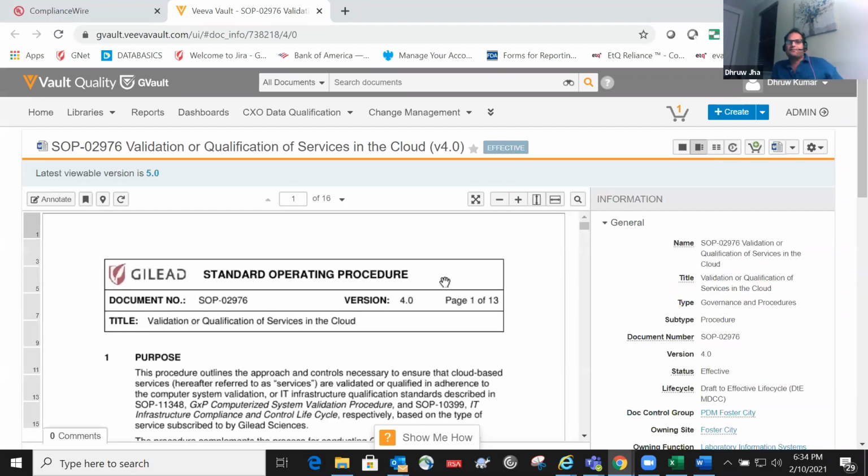Now look at this system for this purpose. This is one SOP. Now you see these signs, everything has to be tested in this system. This system takes 2 years to validate, sometimes more than 2 years, as prospective. And then continuous validation is happening. 20 validation engineers continuously working in this system forever, until the system retires.